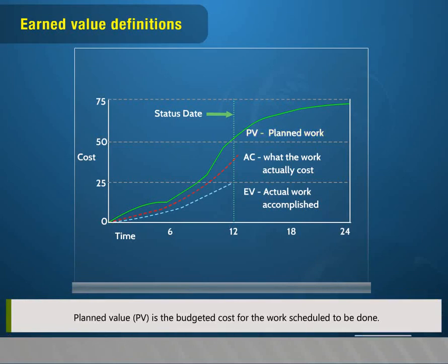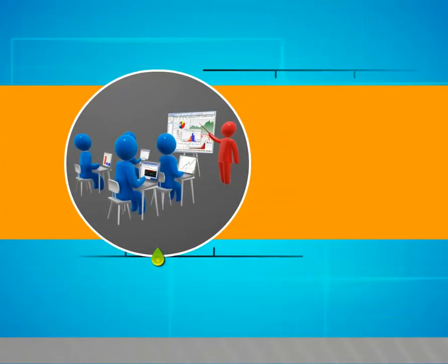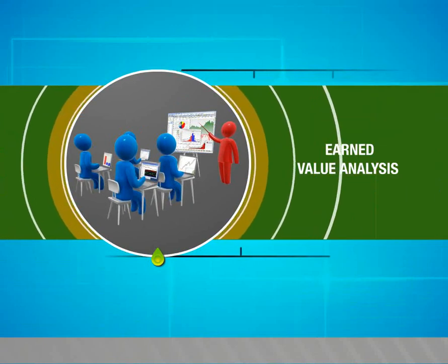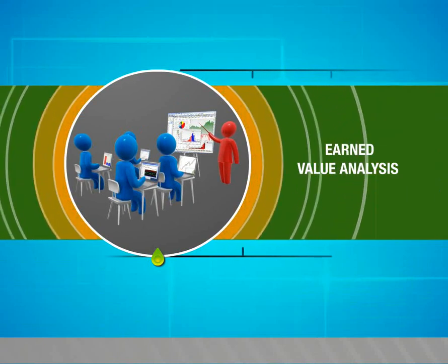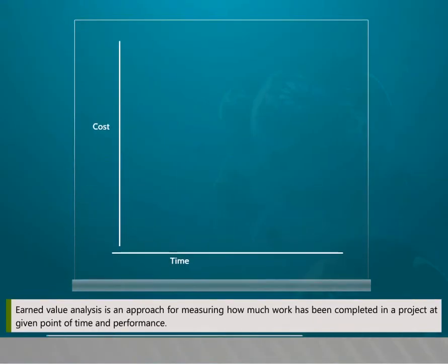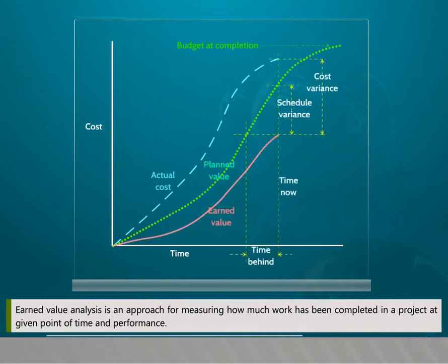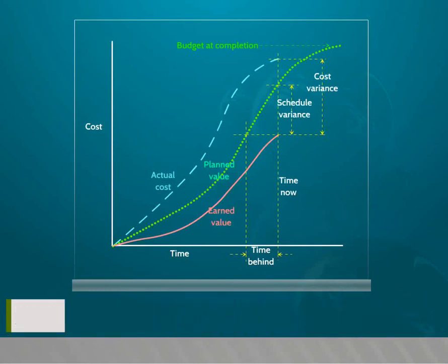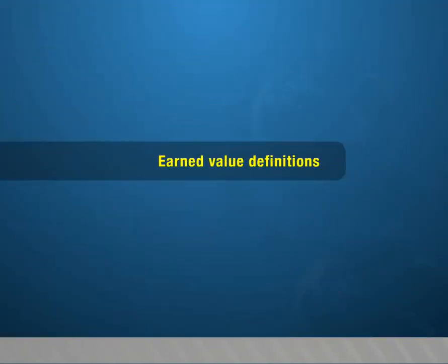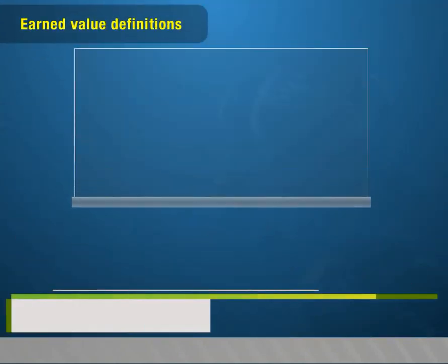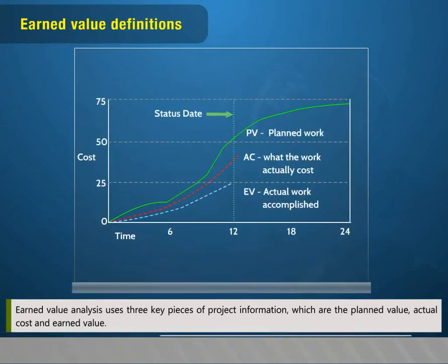Qualitative, that is subjective, progressing techniques are levels of effort (LOE). It is used when it is very difficult to measure what work was accomplished for the budget spent. Individual judgment. It is used for complex work not easily measured by other methods. Even though this is subjective, getting multiple opinions on the work accomplished by knowledgeable team members helps determine a more reasonable estimate on progress.